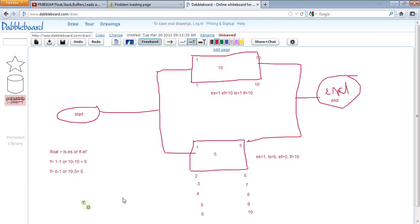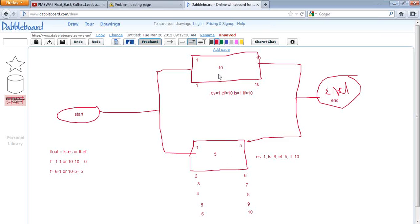Float is also known as slack — both are the same. The key things to remember: activities on the critical path will have zero float, and activities on the non-critical path will have float. Activities with zero float cannot slip even by one day without delaying the project. You can always pull resources from tasks that have float and deploy them onto the critical path. I hope you have understood Early Start, Late Start, Early Finish, Late Finish, float or slack, and the critical path.